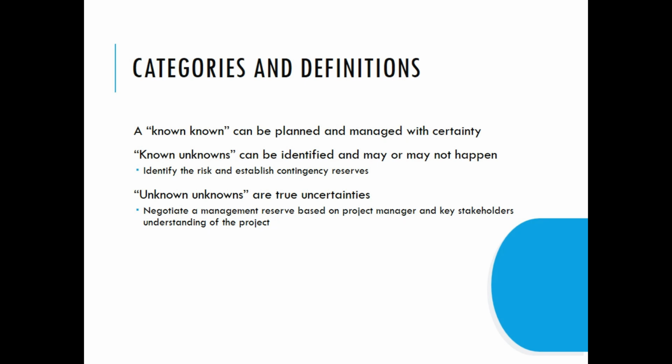Known known risk is always handled through estimation. Known unknown and unknown known risk is handled through contingency plan and contingency reserve. Unknown unknown risk is handled through management reserve. Risk management is done so that we are always ahead of the risk. The risk should not overtake us. The later in the life cycle a risk occurs, the more costly it is. The owner of a contingency plan need not be the risk owner. With an available risk matrix, we know something is wrong.